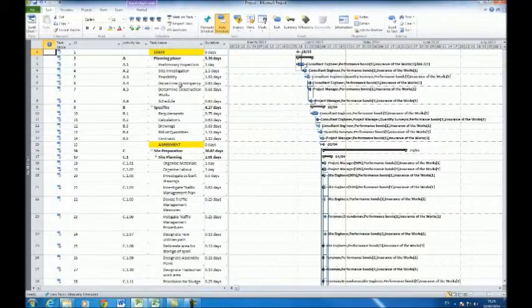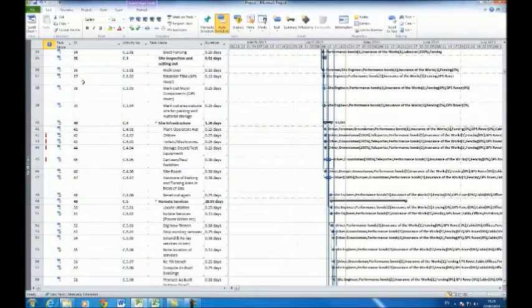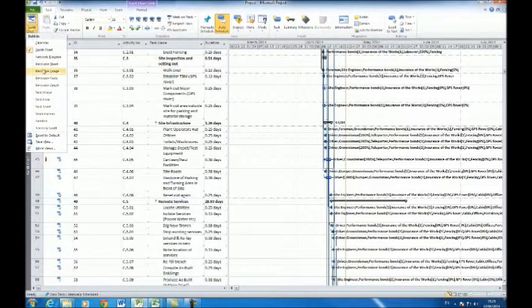Check for over-allocation of resources by examining the information column on the extreme left of the MS Project program for the presence of red men icons. Investigate the over-allocation further by depressing the Gantt chart icon on the top left of the screen and selecting either the resource sheet or resource usage option from the drop-down menu.